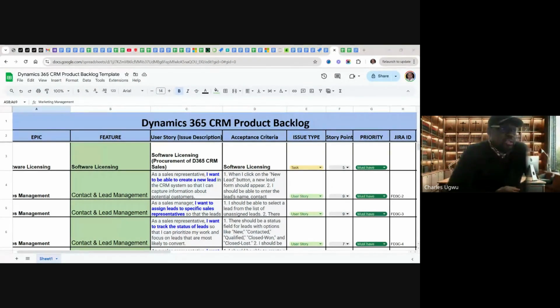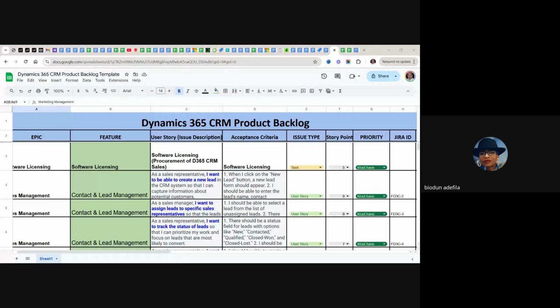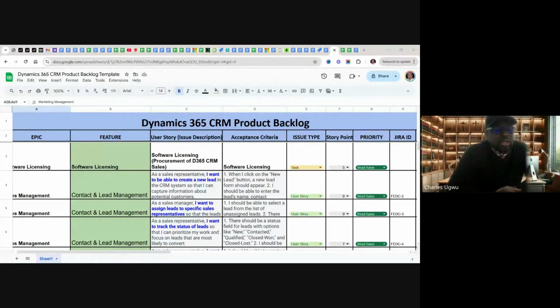But when the story point is low, the effort required to implement that work item is going to be very minimal. But if the story point is low, it does not mean the work item is not prioritized high. It's different. It has no correlation with prioritization. I want you to note that. Are you getting it? Understood, yes. Story points have no relationship with the prioritization.